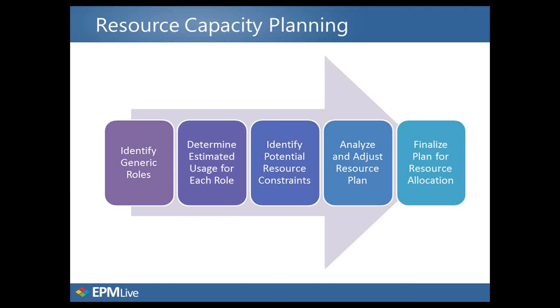Effective resource management relies on the fact that these factors have all been considered prior to selecting your resources. So once you've determined your generic roles, you'll need to determine the quantity of each role as well as the time frame as to when they're needed. As you obtain this information, you'll then be ready to analyze your plan, make adjustments to the plan, and always prepare for the actual named assignments.